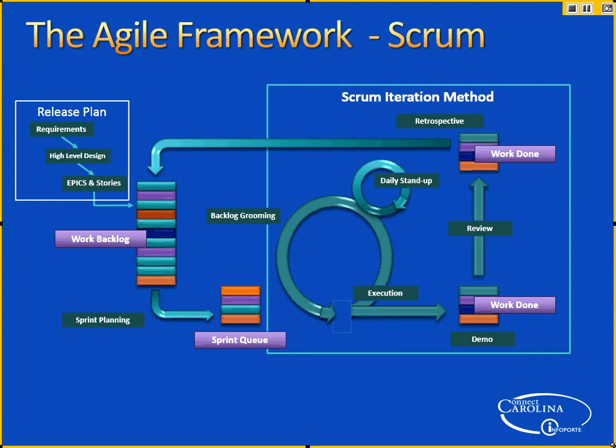And the epics and the stories go into this work backlog, right? So there's a stack of stuff that has to get done for the release they're working on, let's say. Okay? But in any one sprint, during a sprint planning session, they say these are the stories, or sometimes an epic in there that still has to have some work done on it, that we're going to get done in the sprint. Okay? Then you get into execution mode.